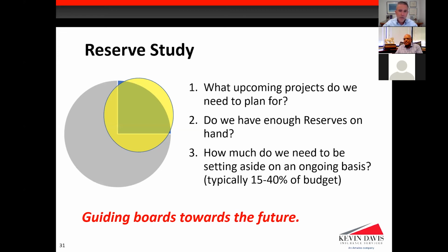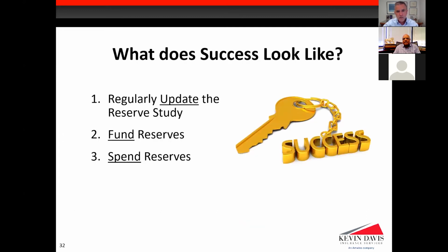It is a perishable document. I encourage you to think of a banana or an avocado: it goes out of date rather quickly, because it's talking about the current condition of things and the current balance between the financial and the physical. So you need to regularly update the reserve study to get fresh information and guidance. When the board takes their eye off the ball and goes years and years without refreshing it, all of a sudden they find they're off track.